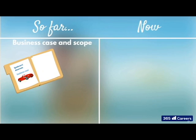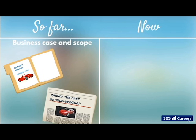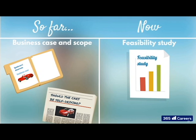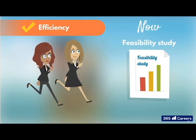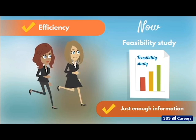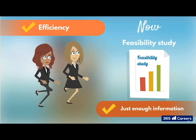So the business case has detailed all your finances. The scope is a guide to what your project will involve, and now it's time for a feasibility study. And it's just what it sounds like. An analysis of the goals, scope, and resources to determine whether the success of the project is feasible. Oh, and bear in mind, the feasibility study is on a mid to high level. The project sponsor and project manager need to move efficiently through the initiation, and the analysis should be just enough to confirm they can go ahead with the time, budget, and resources available. But don't worry. A more detailed analysis and preparation of resources is performed during the planning phase.